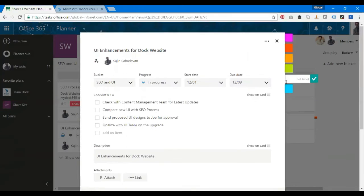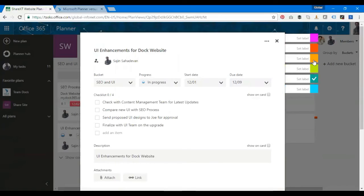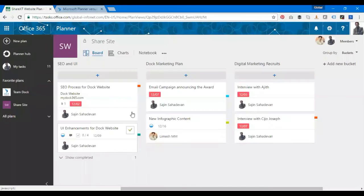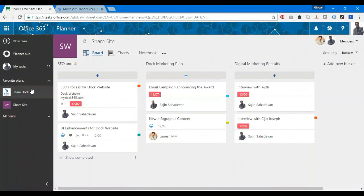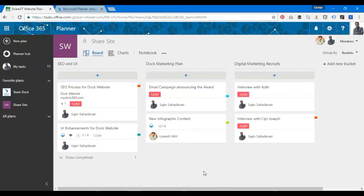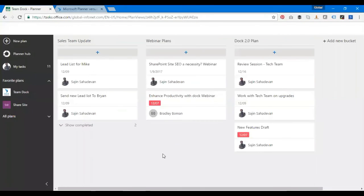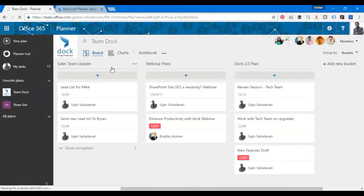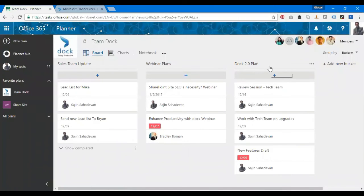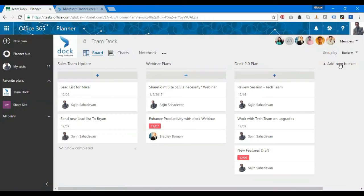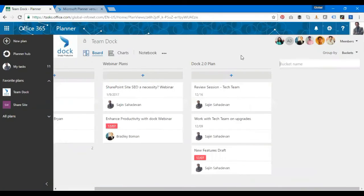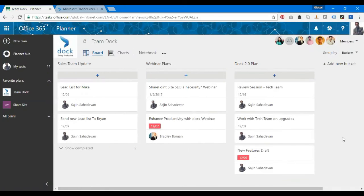That's about tasks. I can also set up labels and put in colors to identify them, like a red one here. The next is buckets. Buckets allow you to organize your tasks into separate categories. I have Sales Team Update, Webinar Plans, Doc 2.0 Plan. I can add more buckets. I have an option to create new buckets—just add a name and create tasks under that. It's a way to separate tasks into logical groupings.